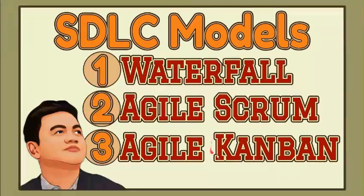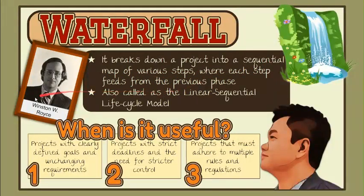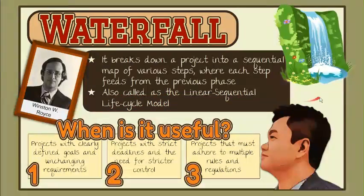The first in our list is called the Waterfall model. This method breaks down a project into a sequential map of various steps, where each step feeds from the previous phase. This method was originally defined by Winston W. Royce in 1970. It is also known as the Linear Sequential Lifecycle model. This model's process of downward mechanism is similar to that of a waterfall.